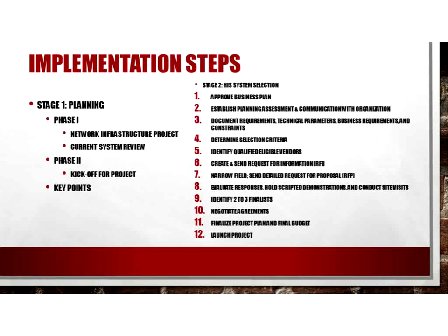These are going to be the only vendors that are going to proceed to your next step. The other vendors will be sent a letter notifying them that they have been eliminated from this process. Then step 9, you're going to conduct detailed due diligence on your finalist vendors. So in this step, your project team is going to conduct detailed due diligence on each finalist in the categories of usability, technology, and business relationships.